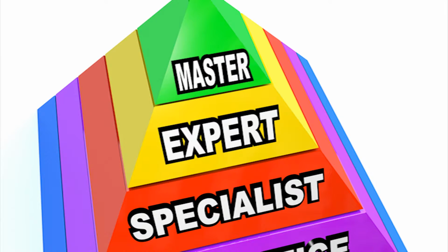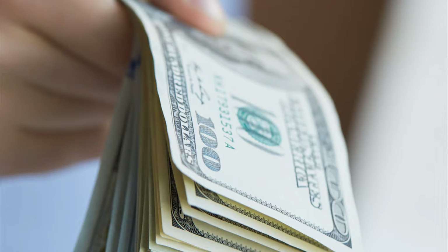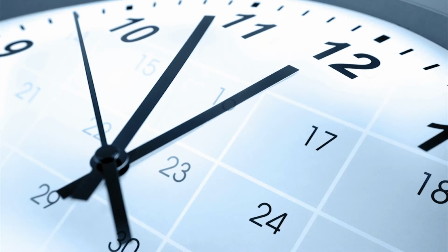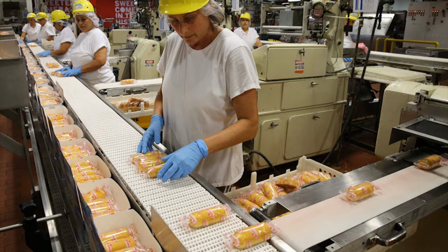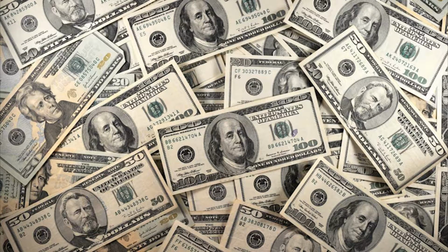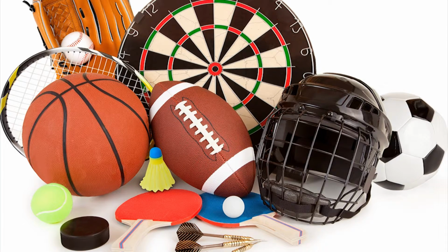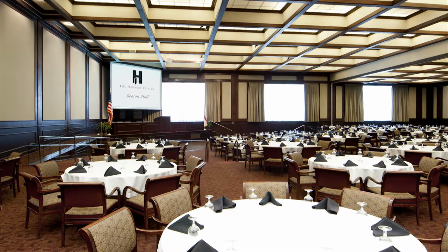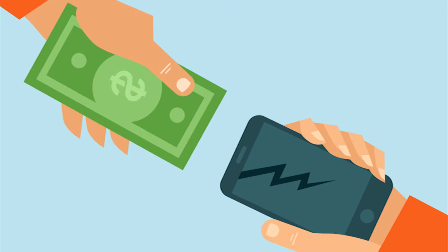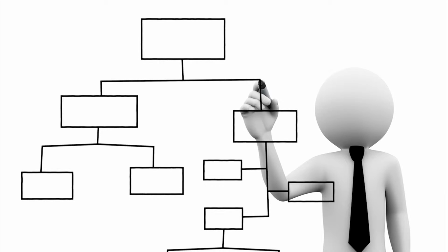The key to mastering this step is to understand the 3 elements needed for your budget. These include time, money, and equipment. Time. This includes people working on the project and how much time they'll spend working on each individual task. Money. This includes the financial resources necessary to complete the project and services that need to be paid for. Equipment. This includes any physical items that need to be bought or rented. This can also include renting or reserving a physical space to use for the project. Lastly, this can involve things that need to be purchased. When all the cost items are identified and estimated, you need to develop an outline of the project budget.